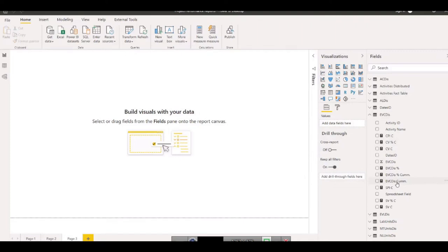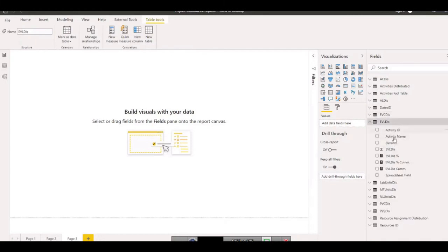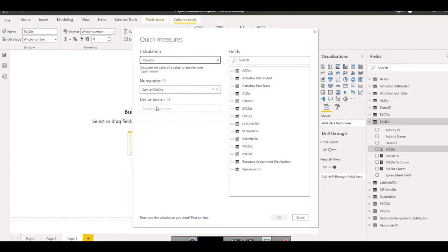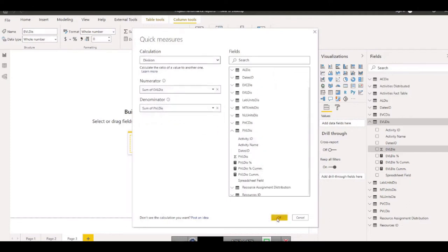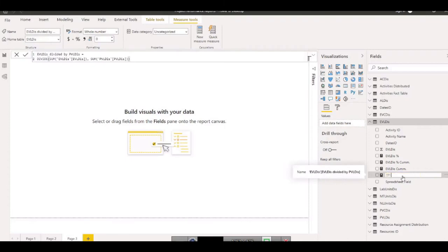So the same parameters I am going to make for the labor units, because there are few, estimate at completion and estimate to complete remaining. We need to discuss that before. So before discussing them, I will go into the labor part and develop the same key performance indicators there. So first is the SPI of labor, which is earned value divided by planned value labor this time. SPI labor.